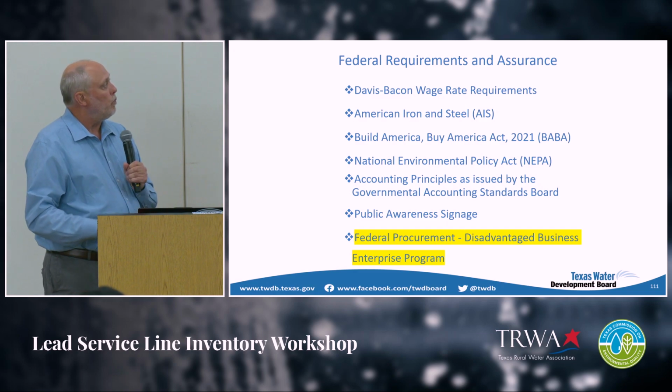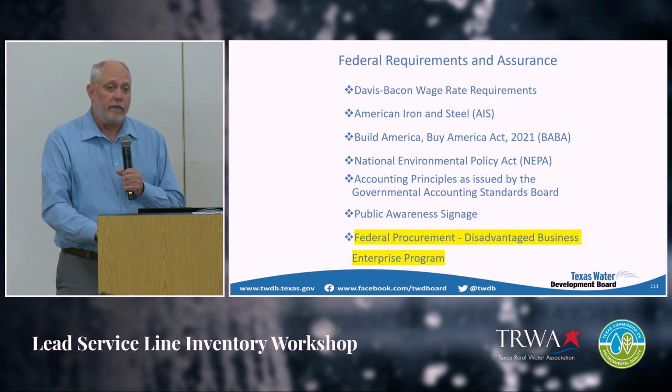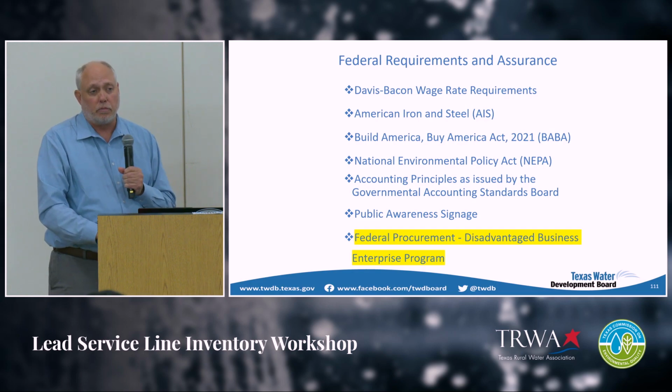But on that website that I just mentioned, they have a list of products that are identified there. But mainly, if you're building something new, a new construction project, it's mostly every type of material except for landscaping material and paving material. So it pretty much covers everything.